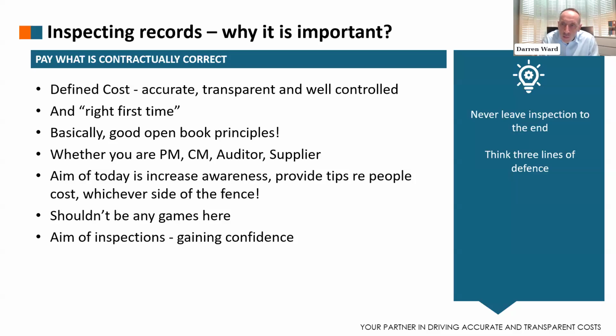So why would you want that third line? Very simply, it could be that you have additional stakeholder requirements. You might have to provide an audit report further up the line for someone, such as the National Audit Office or the Treasury. Or it might just be you want that third line to provide some comfort on a high risk or contentious error or issue.